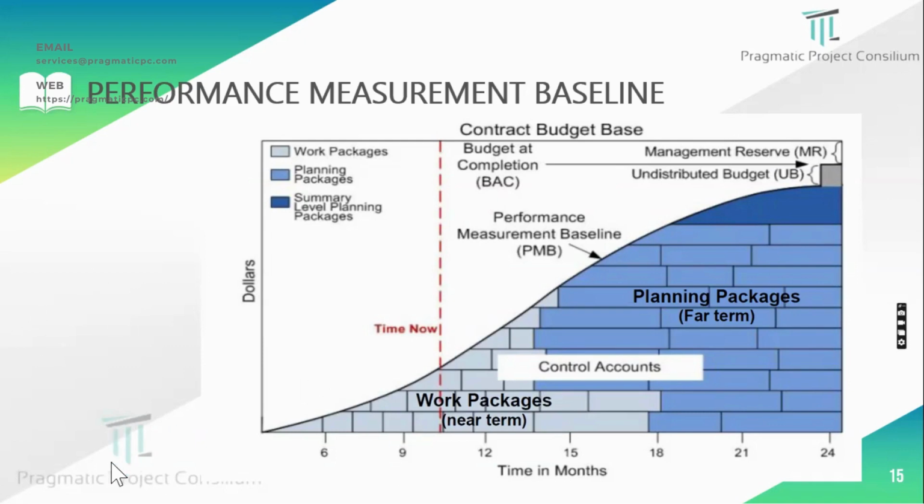Here, very important is representing the portion of the lower level WBS and OBS. The work breakdown structure is detailed into further levels. In some projects, especially infrastructure projects or even shutdown projects, we break down to level 6, level 7 and so on, to control the progress minutely, even on an hourly basis.